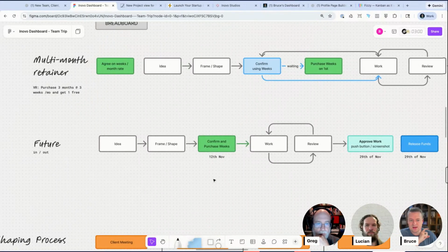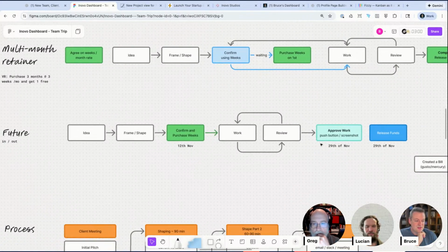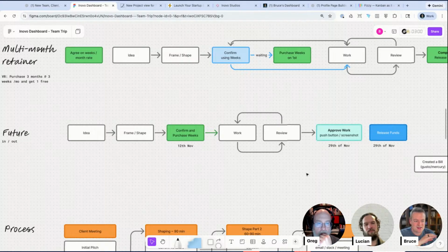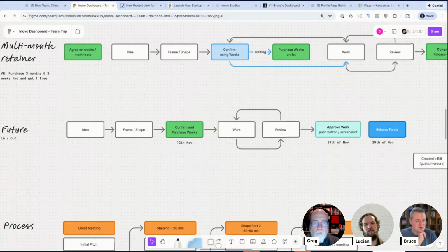Maybe we send something to a client that says, "Yes, I approve this," or "No, I want other changes," and when they hit yes, it's like their signature on the project saying we've now approved this, and the work can begin and we can kick it off. The same thing happens at the other end, like two bookends of the project, because it was a little bit vague. Since we deal in the currency of clarity and crispiness on all our projects, we should have a process that's super clear for clients and the team to know exactly when things are ready to be worked on.